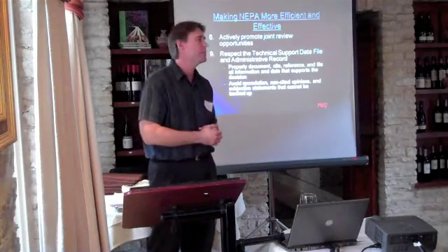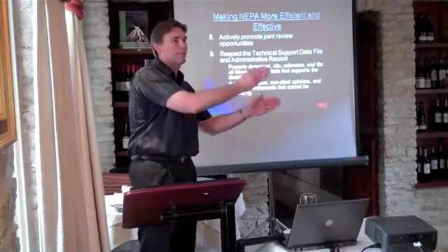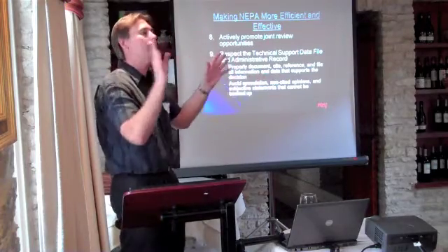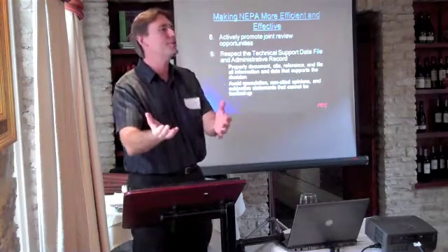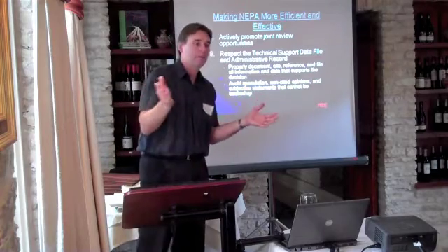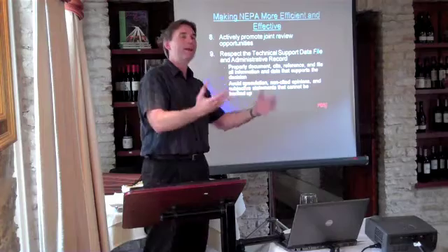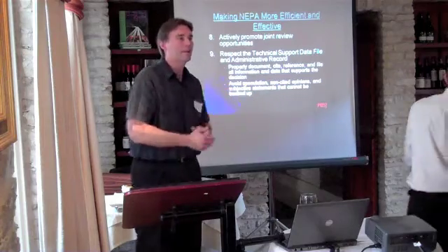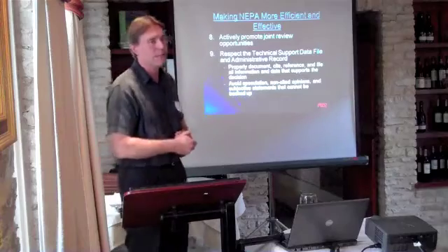Actively try to promote joint reviews. The sequence of reviews takes forever, and then doing your QC at the end just kills projects. It kills the schedule. Your QC should be continuous. Your reviewers should be expecting what is in the document. There should be no surprises. Somehow we're going to have to change the review cycle process.